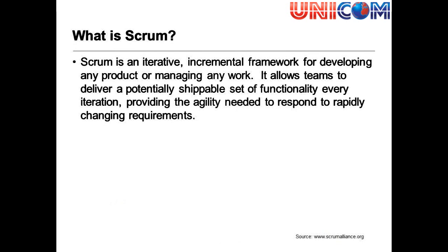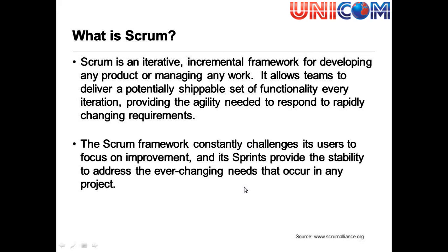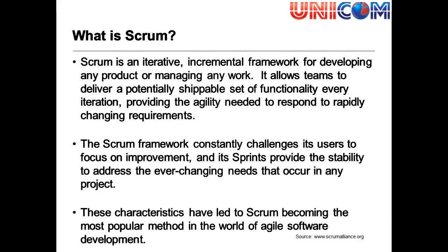It provides that agility, to respond to change rapidly, any changing requirements that you have. Scrum constantly challenges its users to focus on improvement, so you have a retrospective at the end of a sprint. And sprints provide the stability. When we time box a sprint, it does give, in my experience, great comfort to developers and the Scrum team that they know there's this regular cadence, every 2 weeks, for example. Everyone knows what they're doing, what is expected of them. And these characteristics have led Scrum to become the most popular method.